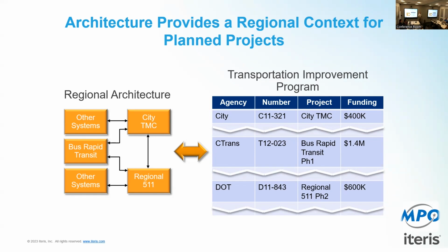So my design needs to reflect that interface to the extent it needs to, but I don't have to implement that interface. So that may be a savings of cost on the front end, but I need to pay for it somewhere along the way. I don't want to pay for it by redesigning the system to accommodate it the next time I have to implement that interface. Just like building a bridge for 3 lanes, but we're not widening the road for 10 years. Right, right. So the architecture gives us that insight, so we know what we're including in the project definition.